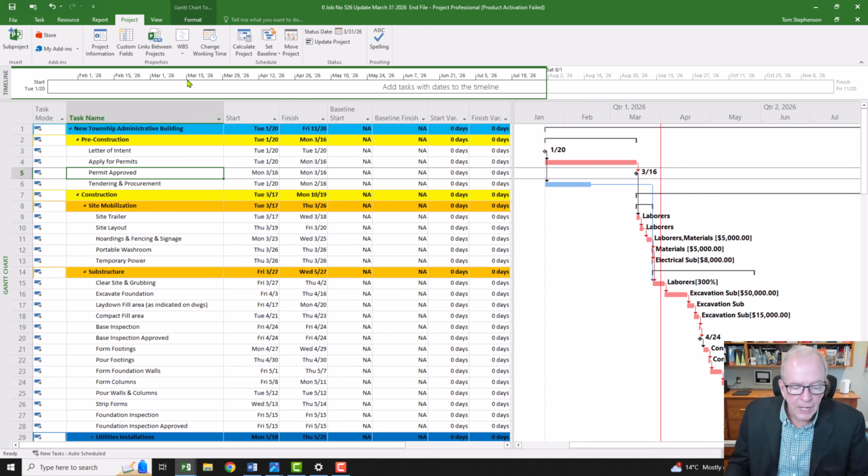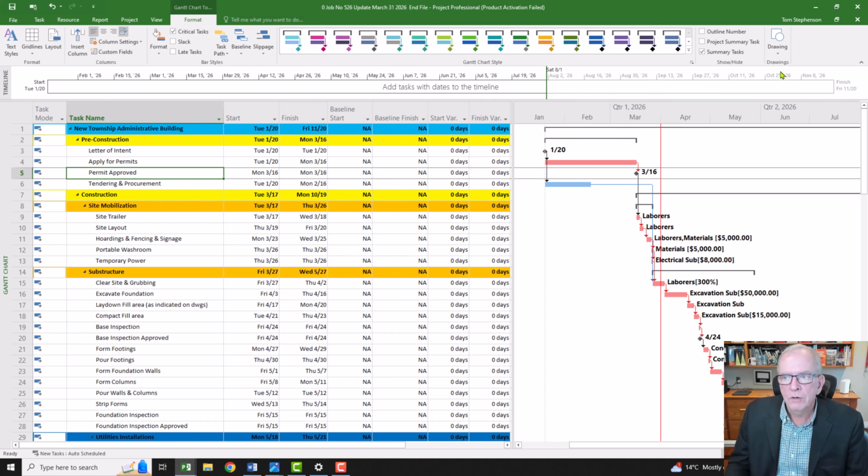So now the next thing, update activities to the left of the status date. And so I usually like to display, just so that you can see what's going on, using the drawing tool. We're going to be updating everything from here, that March 31st, back to the beginning. Usually, in construction projects, we do a formal update at least once a month and more frequent updates in between. For this exercise, because there wasn't too much in the beginning, I'm just going to update from the March 31st date. And so that means you should start at the beginning.